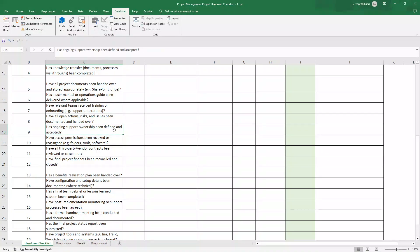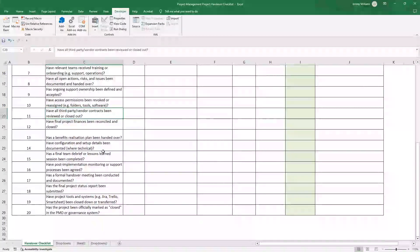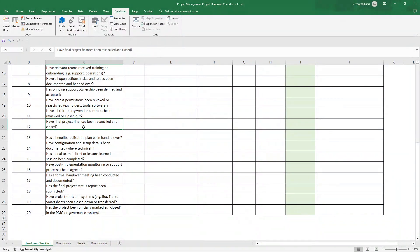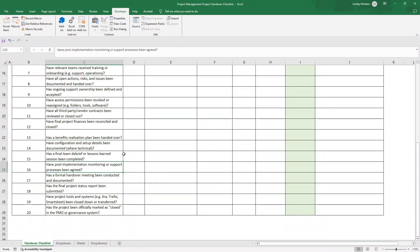Have relevant teams received training or onboarding? Have all open actions risks and issues been documented and handed over? Has ongoing support ownership been defined and accepted? Have access permissions been revoked or reassigned? Have third party vendor contracts been reviewed or closed out? Have final project finances been reconciled and closed? Has a benefits realisation plan been handed over? Have configuration and setup details been documented? Has a final team brief or lessons learned session been completed?